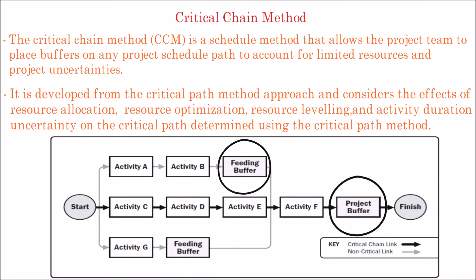Additional buffers known as feeding buffers are placed at each point where a chain of dependent activities that are not on the critical chain feeds into the critical chain. Feeding buffers thus protect the critical chain from slippage along the feeding chains.